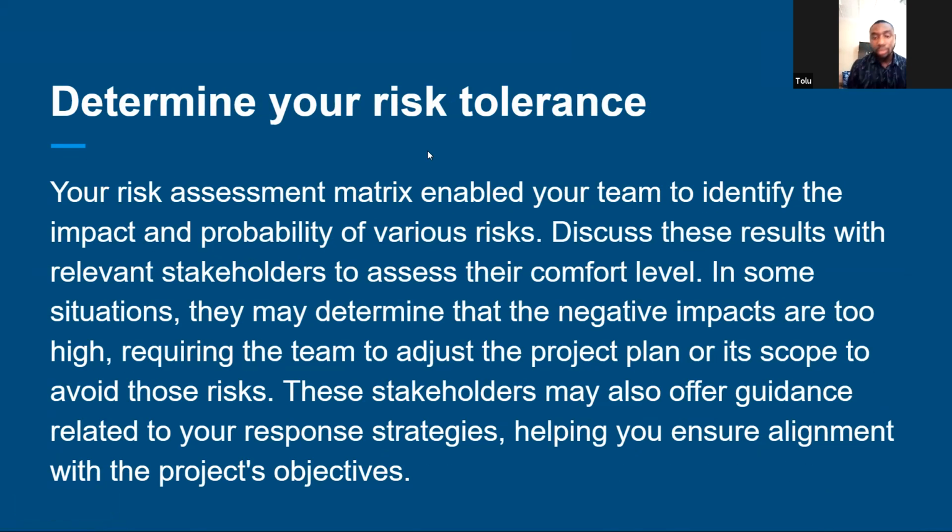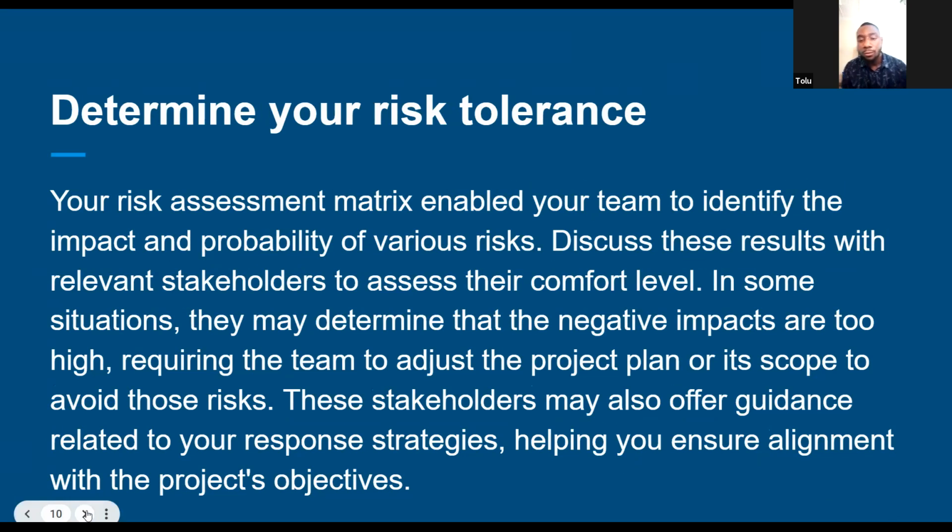Determine your risk tolerance. Your risk assessment matrix enables your team to identify the impact and probability of various risks. Discuss these results with relevant stakeholders to assess their comfort level in some situations. They may determine that the negative impacts require the team to adjust the project plan or its scope to avoid those risks. The stakeholder may also offer guidance related to response strategy, helping you to ensure alignment with the project objective. So yeah, the risk tolerance is that, okay, after you've done your matrix to analyze,